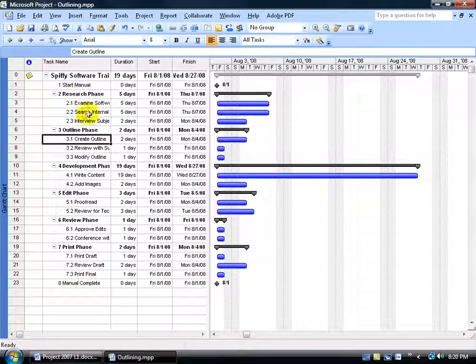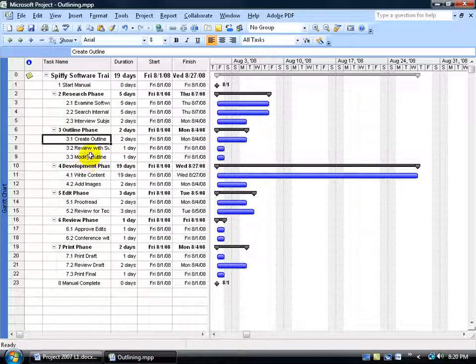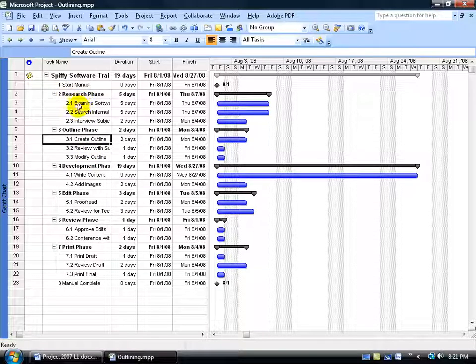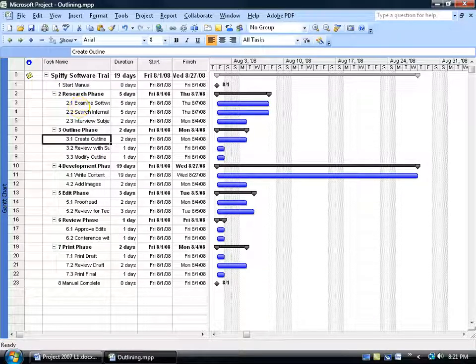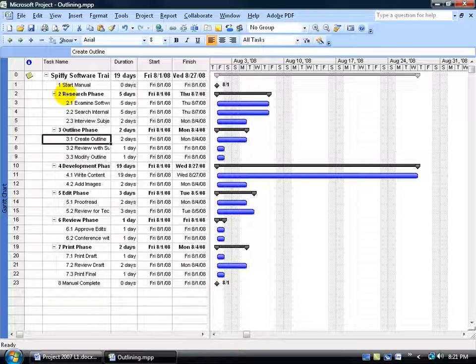We have our 2, and then we have our 2's, and then we have our 3, and then our 3's, 3.1, 3.2. So like I said, later on in reports I'm able to break this down and go, that's right, I may not have the indents in my reports here to let me know that this is the summary task, but I know that when it's a 2.1, 2.2, that those are subtasks to the summary task, which is just plain old 2. And that would be your work breakdown structure or your outline number format.